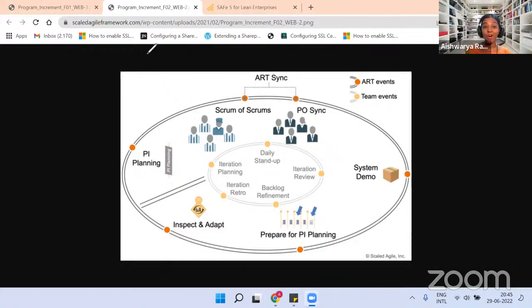Yeah, we showcase the progress. Actually, during the daily stand-up, we talk about how we are progressing. During the iteration review, we showcase the progress to the team stakeholders or relevant stakeholders, and we take the feedback. So how do we showcase the progress? By showcasing the demo of what we have accomplished, right? Yes, of course, the PO and stakeholders of the team will come and provide the feedback to the team, correct? So that the team can improve the product accordingly.